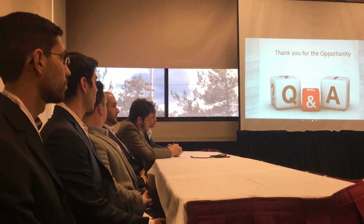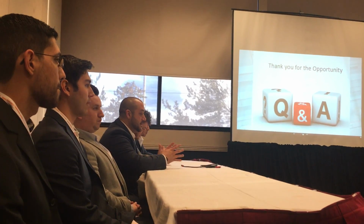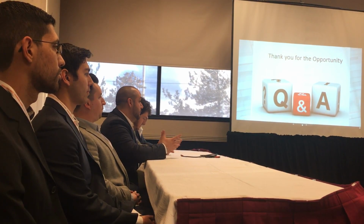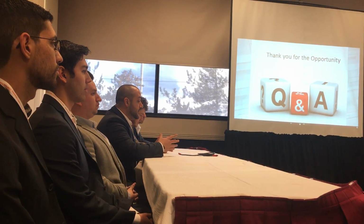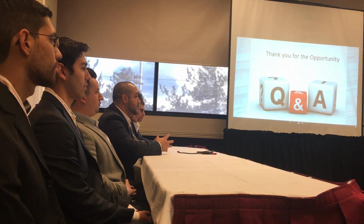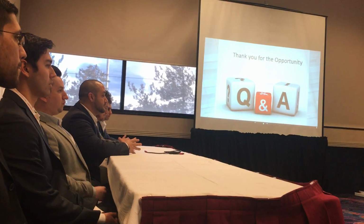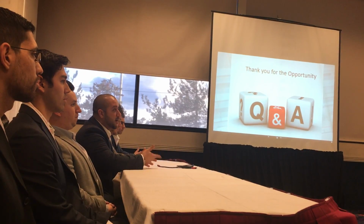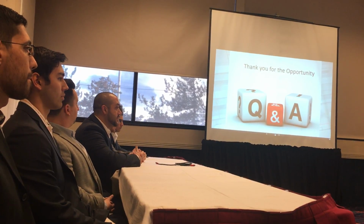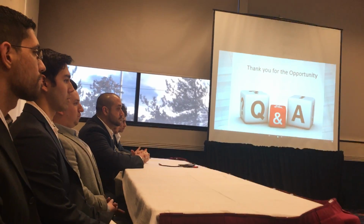We utilized the space efficiently, like I mentioned, because we decided it would be better to have the construction offices on the first floor in the part of the building where we don't have any expensive equipment or any delicate items going in. And we figured we would leave it there and utilize that space until, I think it was 2 months before turning it over to the owner. So after you did that, you probably have to do any activities after that too? Right, come in and remobilize your framer, your drywaller, and there's 2 bathrooms in there for the employees, 2 showers also, so that'll be built up.